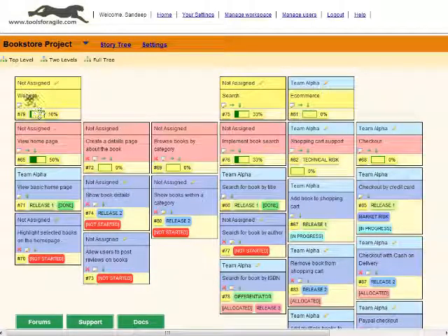And you can look here at the top level headings. So on our website we've got a whole bunch of stories to do, and we're 16% done on that. On the home page we've decided on doing 2 stories, 1 is done out of 2, so our home page is 50% done. If you look at search, we've implemented 1 type of search out of 3, so it's 33% done. And the e-commerce part of it, we've still not done any story complete as of yet.